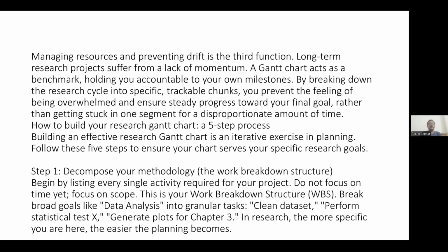So how to build a research Gantt chart? It is a five-step process. Building an effective research Gantt chart is an iterative exercise in planning. So the following are the five steps. Step one is to decompose the methodology. That is the work breakdown structure.